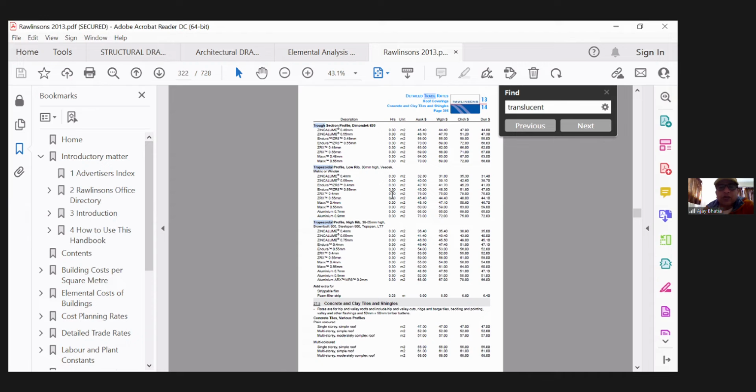So when you got the comparative rates over there, which you picked up for the whole of the roofing, which includes your wire mesh, safety net, and your breathing paper and everything, you don't have to build up. Just go for the whole area. Yes, I did that, but I separated the translucent roof. Yeah, that's okay.